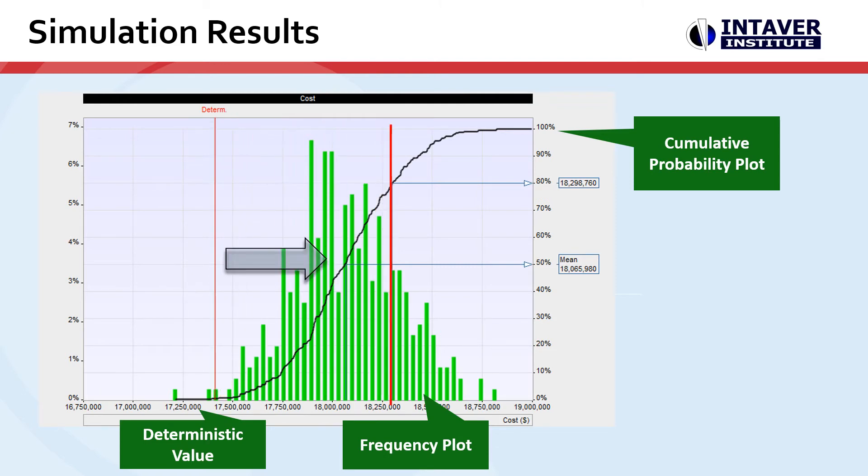Here we can see P50 and P80. P80 is often the confidence level that we will set schedule margin and cost contingency at.